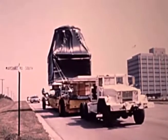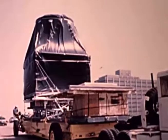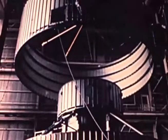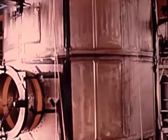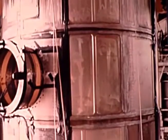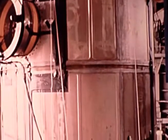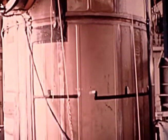While preparation of flight hardware was underway, at Marshall, preparation for the first major testing of AAP modules started. Early in the quarter, an airlock module test article was delivered to Marshall and placed in the structural test stand. Then the multiple docking adapter test article was placed in the test stand and mated with the airlock module and a portion of the payload shroud. This effort was completed by mid-June. Preparation for the tests, which will simulate launch and orbital docking loads, continued through the balance of the report period.